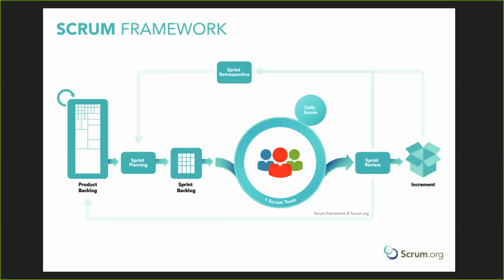We know how to put a label at the top of the page. It's something that needs to be done, so we're going to give that a 1. But for being able to display the time running on the screen in a way that's visually appealing and legible, that might be like a 3 or 4.